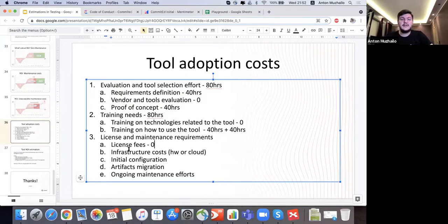Then we come to infrastructure costs. Where are we going to host it? Let's think we host it in the cloud, and the cloud costs will be, I don't know, $100 per month. See how to convert $100 to engineering effort. Simple. You know the rough salary of an average specialist, so you can compare. And $100 per month is a very, very small thing. So we can just put it as 0 because it doesn't mean anything here. So just 0, okay?